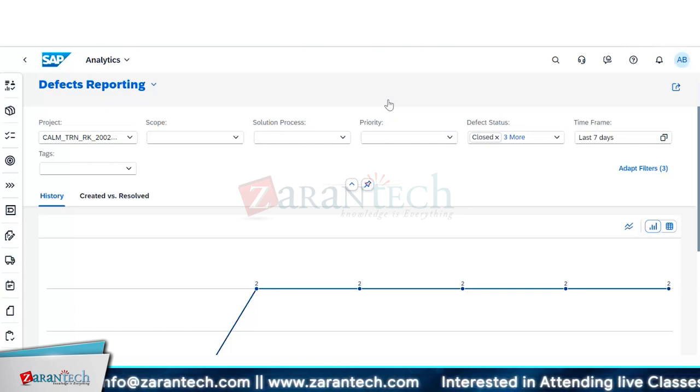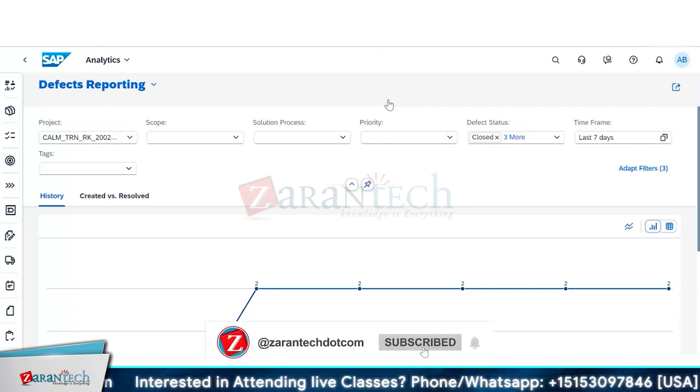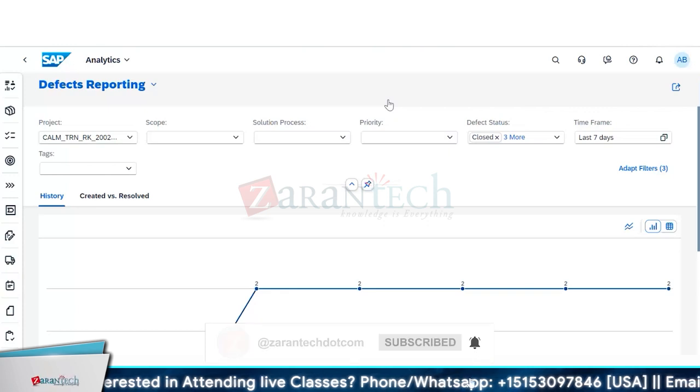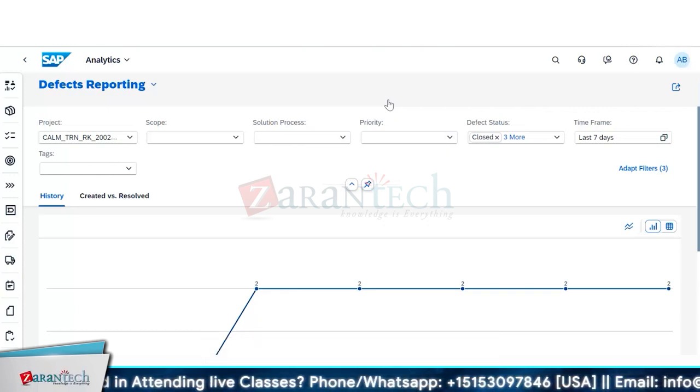But as standard practice, it should be zero, or at least there should be no major defect still open which will hinder the go/no-go decision. That is the standard, but in reality there's a difference. In most projects we do carry some defects from the project life cycle into hypercare, though ideally you should go with zero defects.